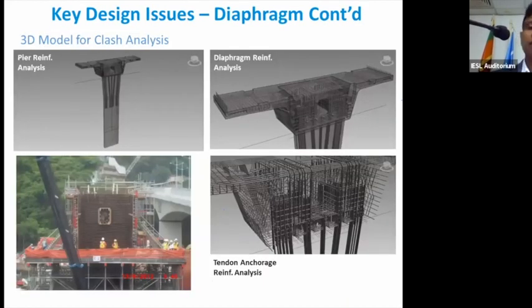This is a project that I worked on when I was working for Atkins. We used beam modeling because we wanted to identify clashes, and because the amount of reinforcement is enormous. Hence, we developed this model, and as you see, it's very useful. Otherwise, you need to visualize when you review the drawings and think about all the areas where there's no clash. I had to spend a lot of time on this project so that no clashes would happen.